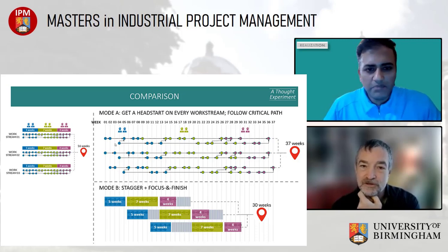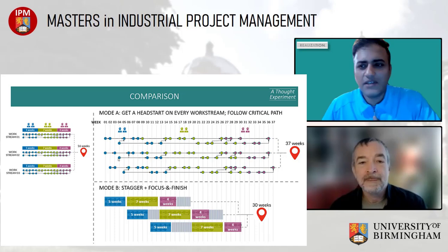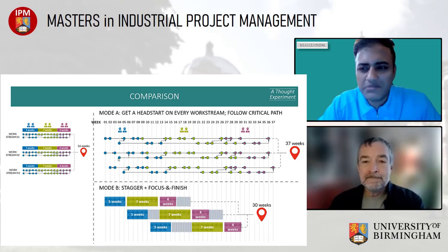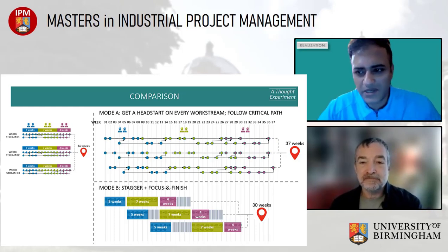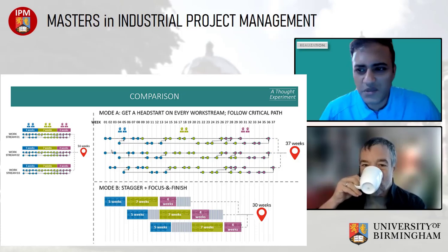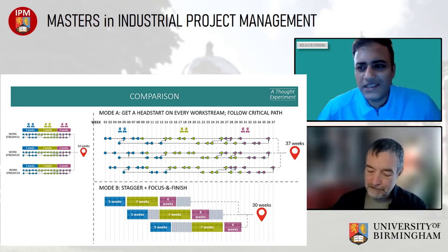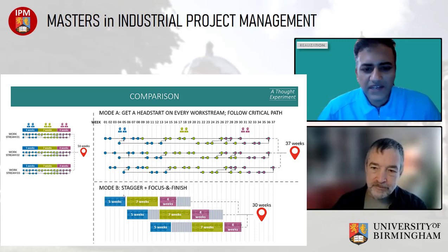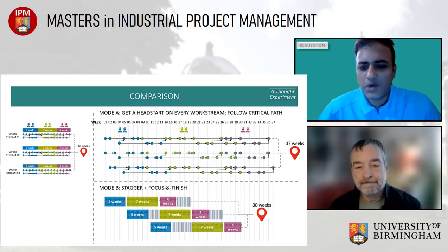Okay, so in the picture above, this is left to the front line, because project management traditionally doesn't recognize this problem at all. The resource allocation is an issue. So it is left to the front line. And if it is just left to the judgment of everybody on the front line, then it's not controllable. But if we can give a logic, create the boxes or the batches on top, then we are not trying to coordinate the front line. We're not trying to do the front line work. So the front line still allocates resources, but inside the box.